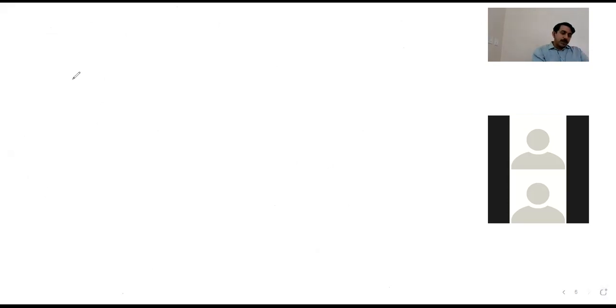So first comes 1-2. How do we represent 1-2 activity? Here is 1. So activity 1-2 is nothing but setting up of the sales office. So physically, the owner has purchased that particular sales office. So this activity is over, is finishing. This activity is starting here, and the same activity is finished. So this is the ending part of the activity, correct?